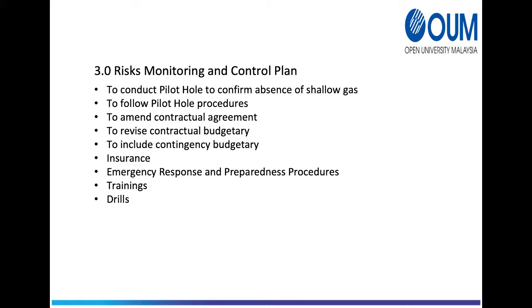Some of the risks that are insurable for this project are covered by insurer. The provision with terms and conditions has been agreed by both client and contractor and included in the requirement in the contractual agreement. The types of risks which were insured during the project were property damage, indirect consequential loss, legal liability, and personnel related. The emergency management at work site is specified in the contractor's emergency response and preparedness procedure and shall be strictly adhered to while working on board work vessel.